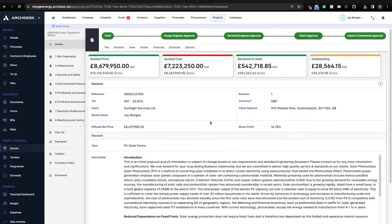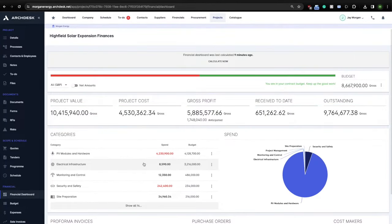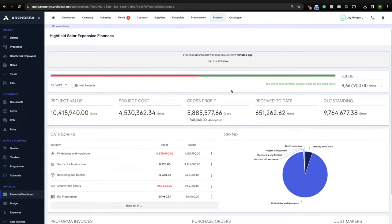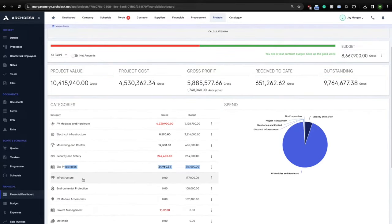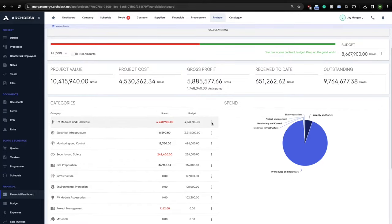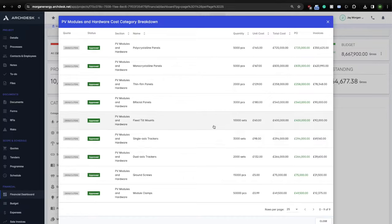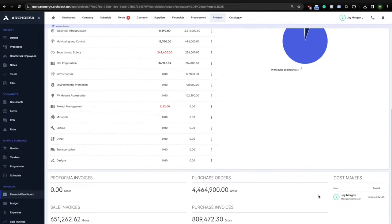Once a quote has been approved, congratulations, you just secured your ArcDesk project. Now your project financial dashboard is alive and can report to you in real-time high-level financial performance of this project. Your estimated cost or the budget, the actual project value, the anticipated profit from your estimate, the actual gross profit based on real-time cost calculation of this project, your high-level cost control categories, alongside the estimate cost, as well as live actual cost. You can run a budget breakdown to find all the individual quote items within each category, their estimated value, actual purchase order value, and actual supplier invoice value. You can quickly find out where you made or lost your money.